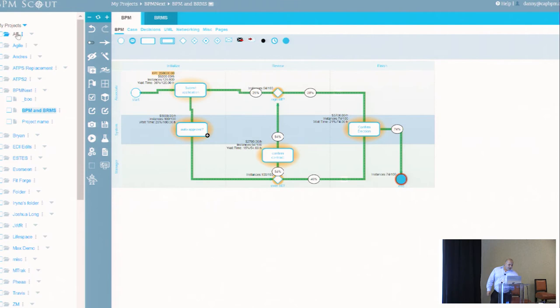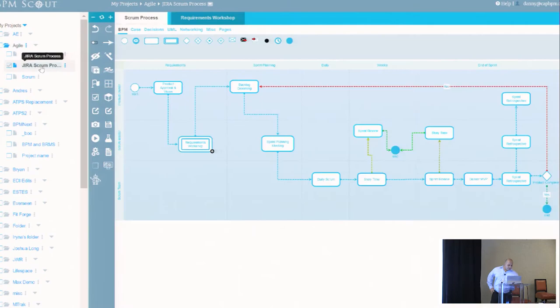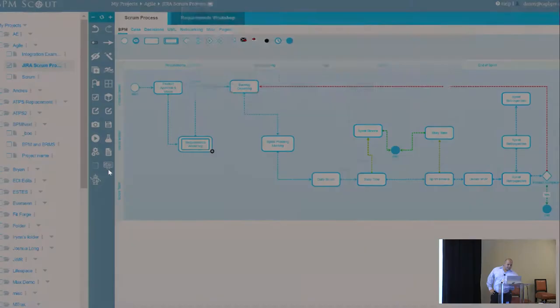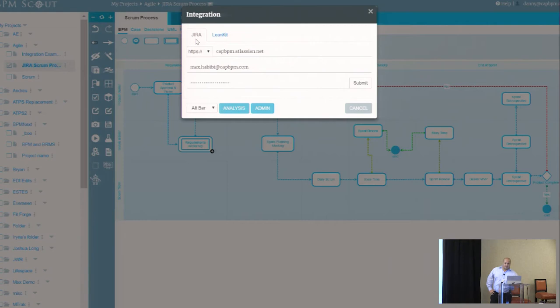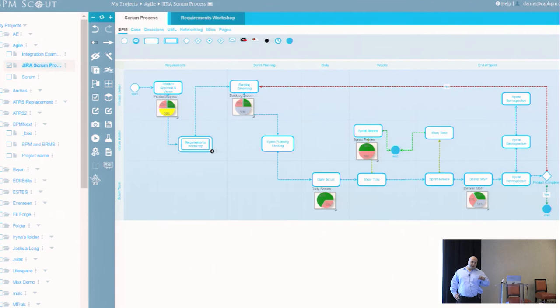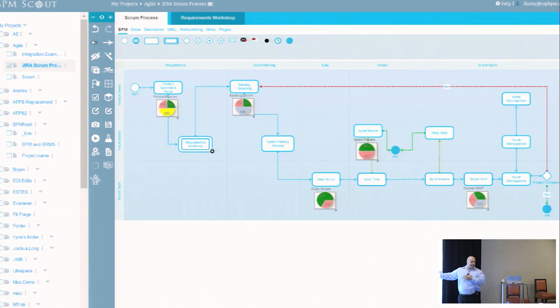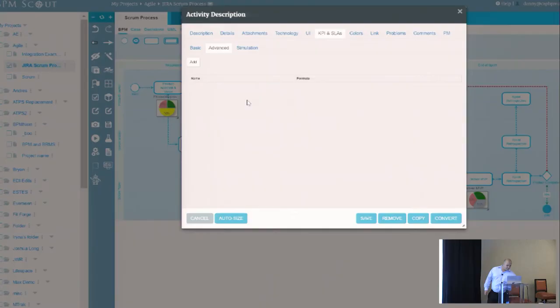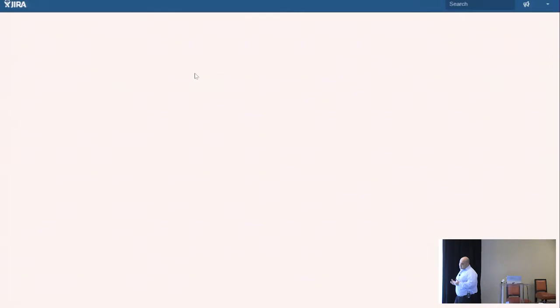I also believe that we have a responsibility throughout the lifecycle of the project. So one of the things that we do in the tool is that we actually integrate with project management tools. So you can integrate with JIRA or link it. And you can actually come in here. And for each one of your activities, you can actually link them to JIRA tickets. So the idea is that you can actually come in from a project management perspective or from a leadership perspective. And you want to know how done your project is? It's this done.